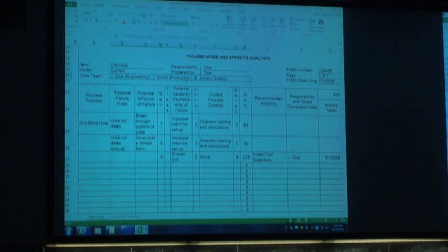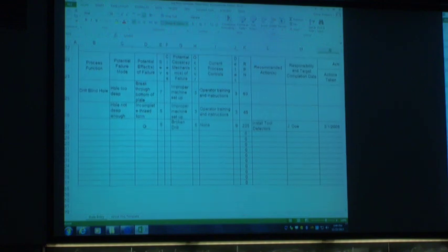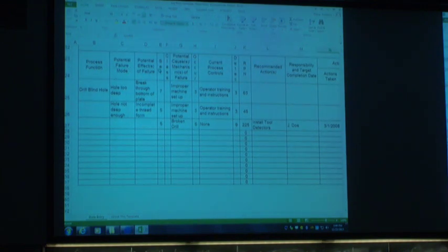You'll have a listing of the core team. That should be the people who have created this document, and it should include all of the relevant people in your team who've done that. So if you have on your EPICS team the design lead and the team members, that would be appropriate. When you move into industry, you'll probably have someone from the design group, the quality group, and the manufacturing group go through and do that. Oftentimes there's a number assigned to the FMEA. There's really no reason for you to do that for your EPICS project, but you will want to give it a date and a revision number or letter so that when you update this, you know which one you're looking at. So as we go through and look at each of these, you'll see the severity, the occurrence, and the detection, as we talked about. They've given these a 0 to 10 number.